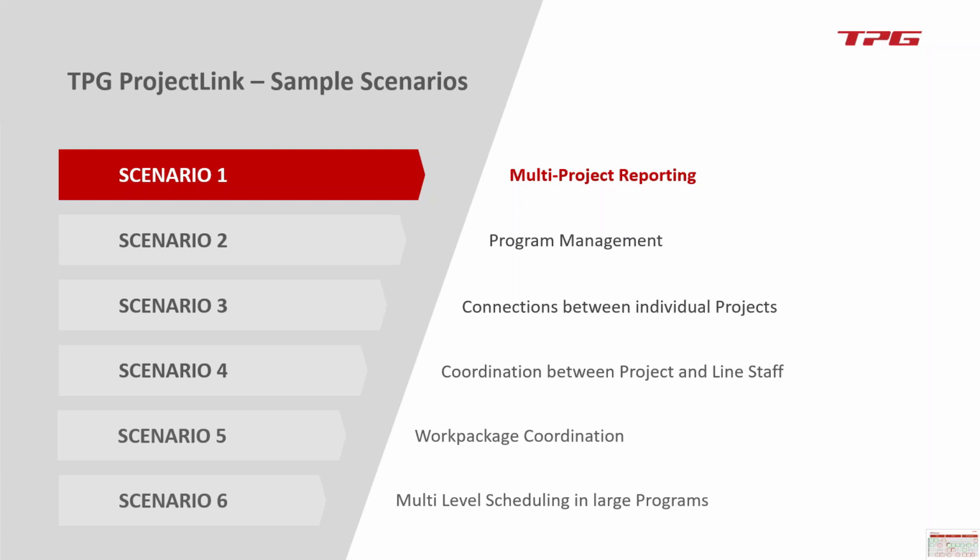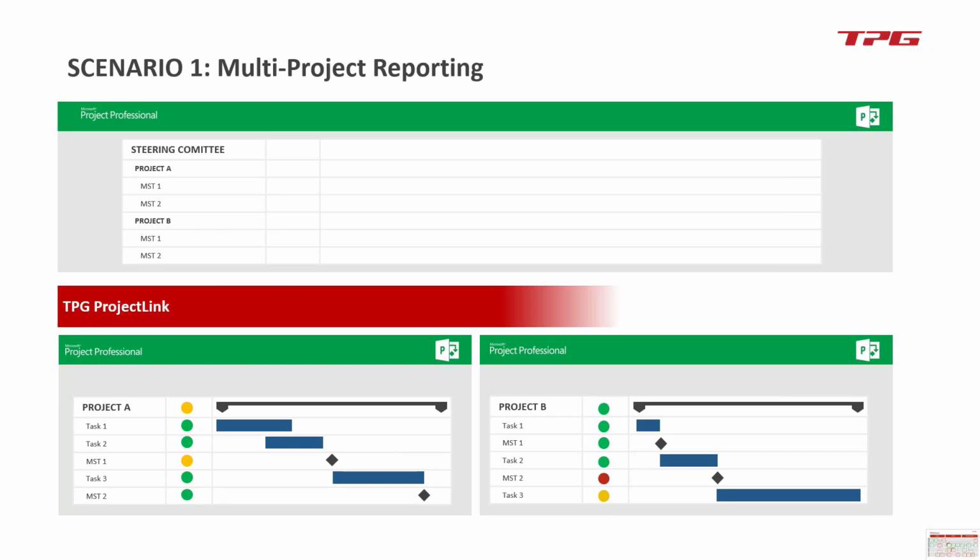And then we would like to show you scenario number 4, which is what happens very often: the project manager plans in his schedule work packages or activities that are being delivered by teams. And teams would sub-detail those activities at their level in their plan, but there needs to be communication between what the project manager expects from subcontracting the piece of work to the team, and how the team is organizing itself to respect or not the delivery date. So those are the scenarios we're going to cover. And I'm going to jump into scenario number 2 right away.